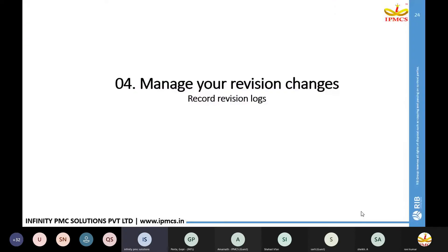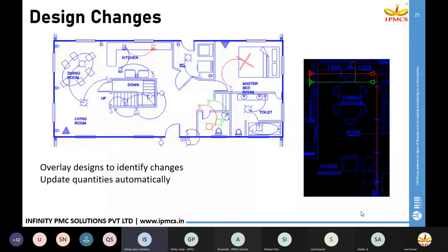Next we are going to see how revision logs are maintained and how we manage revision changes. You can prepare a revision log starting from revision number 1, 2, 3 and continue. Once the revision log is created, you can add your revised drawing and compare the older drawing to the newer drawing to see what has changed. Once you have an idea from the comparison, you can update your quantities automatically.